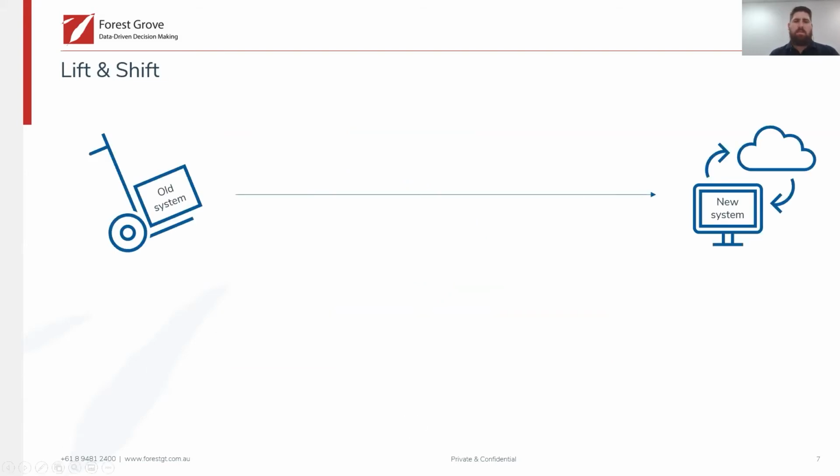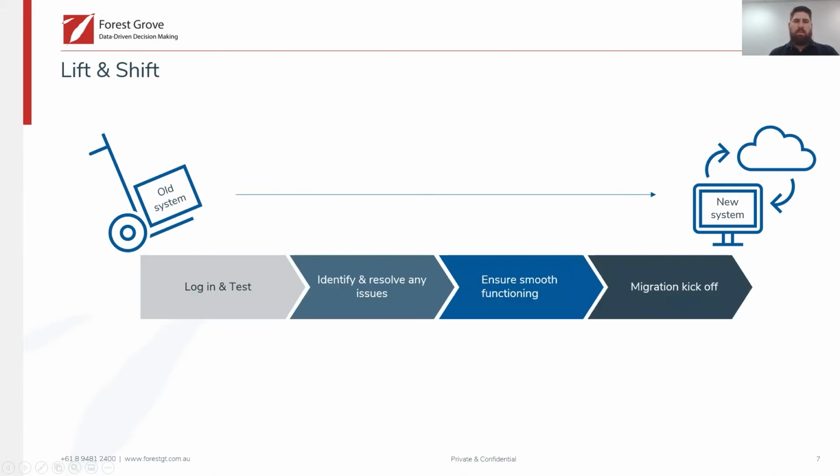So we've aligned the business expectations about what Prophix can do. We've streamlined and documented the critical elements. The next sprint, we do our lift and shift. We implement a change freeze, take some backups, and we copy the whole thing to Prophix Cloud. So now we have a like-for-like environment in Prophix Cloud and in your on-premise environment.